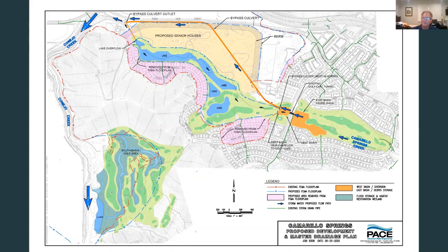Okay. And they would probably, as I understand it, from discussions, put up some sort of special assessment district to cover the cost of that maintenance. And all of that would be assessed to the new homeowners in the proposed senior district. It would not be assessed to existing homeowners. That is how New Urban West is proposing this to be done.